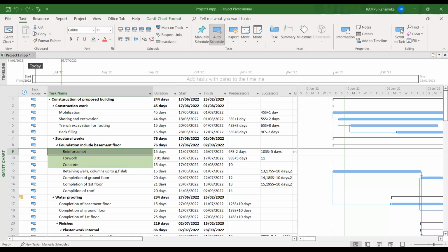That means what is the number of cement required for 1 meter cube. Then also for the sand. So in here, 0.5 meter cube is needed to complete a 1 meter cube of concrete mixture. So then what is the requirement for 154? Likewise, we always have to complete this first.